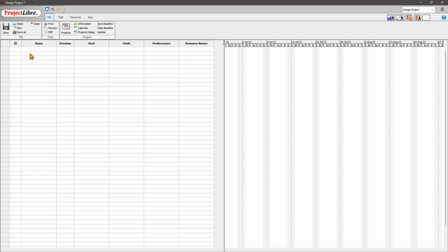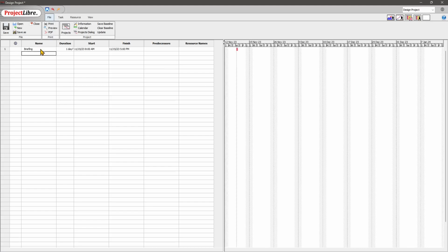So let's start with something. Let's go here to name and let's call this briefing. Okay, so this is going to be the first thing we're going to do, and it's going to last 1 day, or let's say it's going to last like 2 days. Okay, so this is going to change here the visual representation of this in here. So let's make it 3 days, so it's going to be a little bit bigger. And so this is going to be like the starting phase, the starting task. It's going to be like initial briefing or something like that.